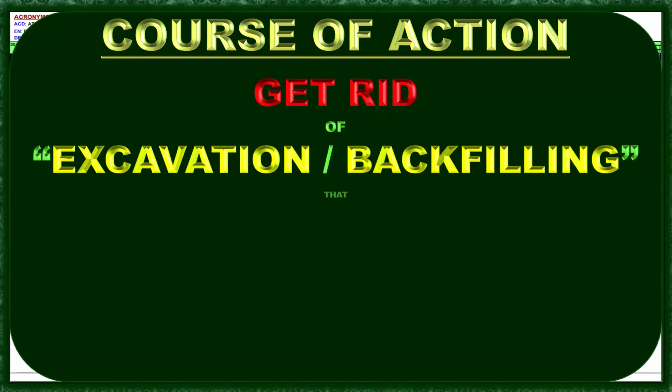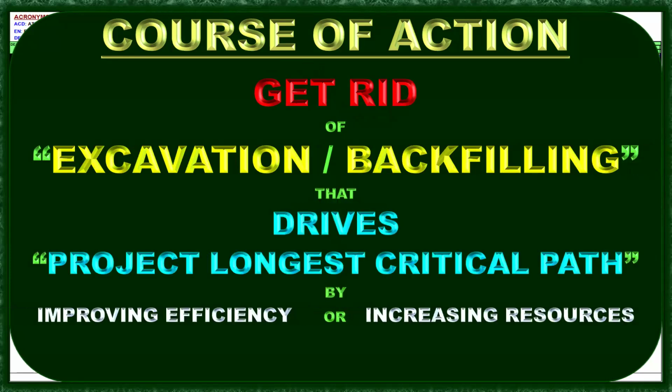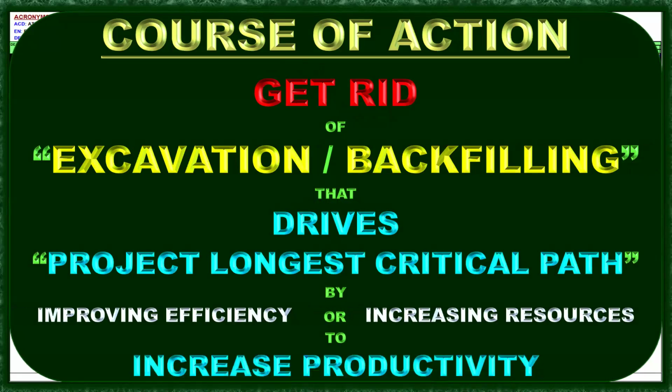Moving forward, the course of action: get rid of excavation backfilling that drives the project's longest critical path by improving efficiency or increasing resources to increase productivity. This is based on the updated program or schedule, so we have to analyze it and report it to the team.